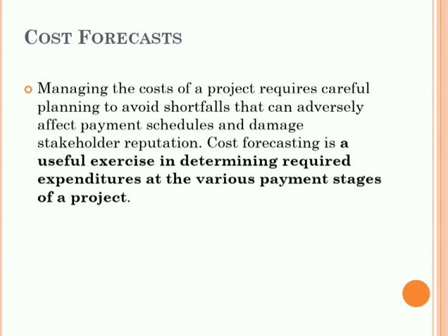The next step is detailed analysis and forecasting. The total cost forecast on a live project is the sum of either of the two: actual cost and remaining cost, or committed cost and to be committed cost. Where actual cost is concerned, most companies work on actual-based accounting, which means that the cost of the work done to date is booked in the books as actual cost, irrespective of whether an invoice is received or not received, or a payment is made or not made.